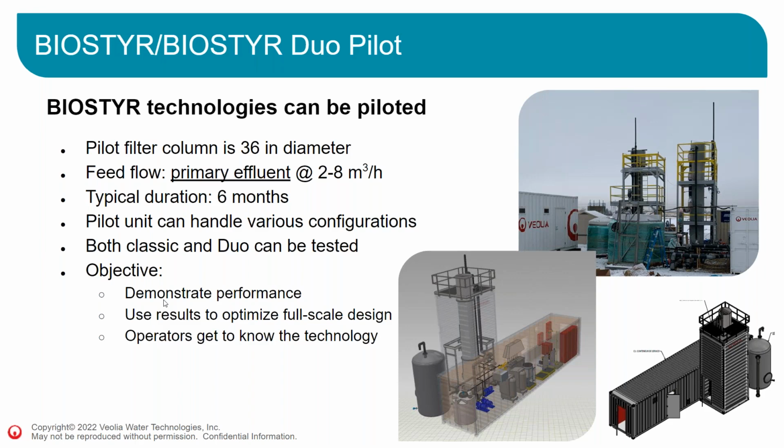One of the big highlights of piloting that we need to really stress here is that the operator gets to know the technology. The operators can play with the pilot, they can work with it, they work with the people, and they have people coming for training and to follow the pilot, so they can really play with it before going large scale. So it's really helpful when you go to commissioning and everything. You have the knowledge already in your hand when you start the full-scale application.